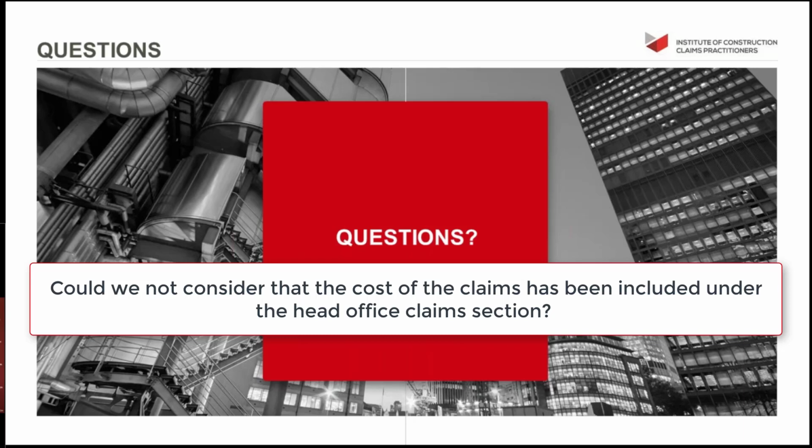Likewise, Tate & Lyle gives us the opportunity of recovering in-house staff management, and you can apply that backup to your recovery of claim costs, whether you have them in a general head office section or in a specific head of claim. And if the contract administrator is, as so many of them are, reluctant to pay for the costs of preparing your claim, you can defend that using this information, whichever section they're in.